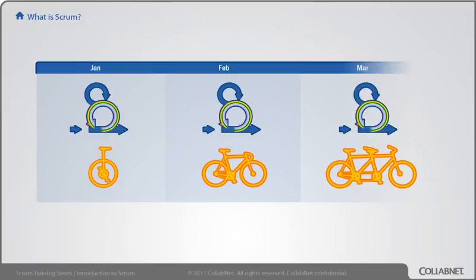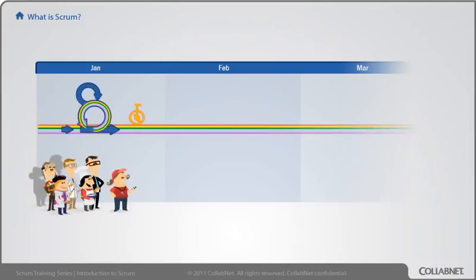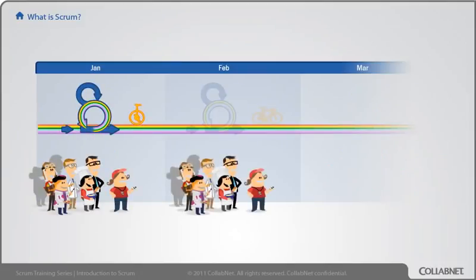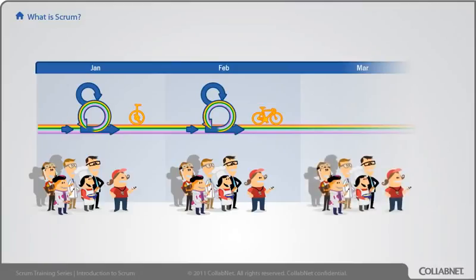Sprints are officially 30 days long, and most Scrum teams are doing them in less, such as 2 weeks. To make a shippable product every 2 weeks, we're going to want people with skills in testing, in design, in business requirements, in coding, all on one cross-functional, self-organizing team. Now, instead of waiting for the end to start our testing, we'll start testing with our very first sprint.